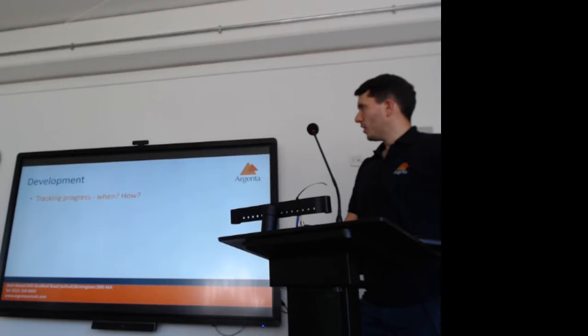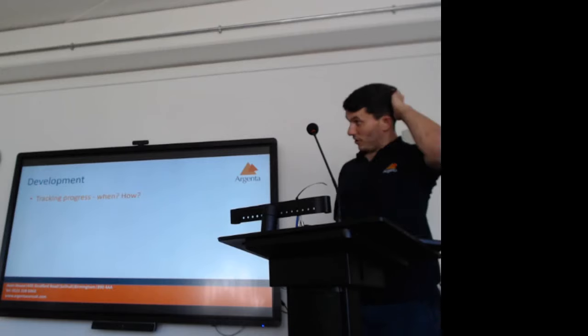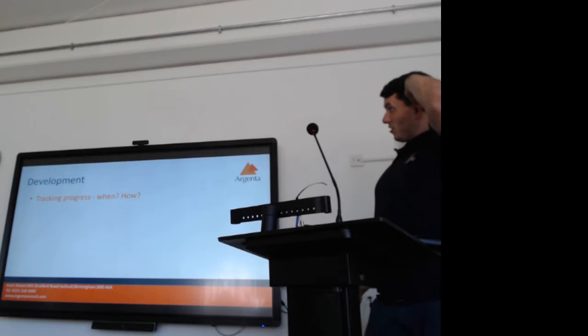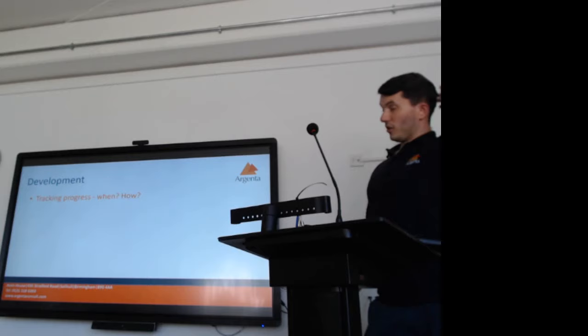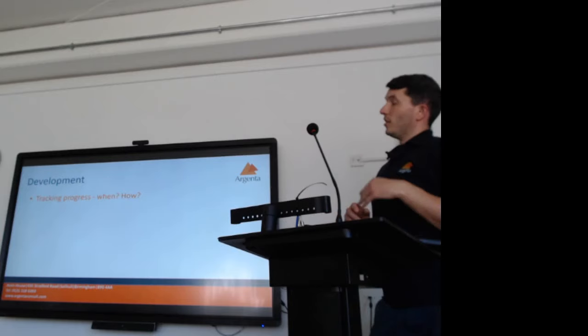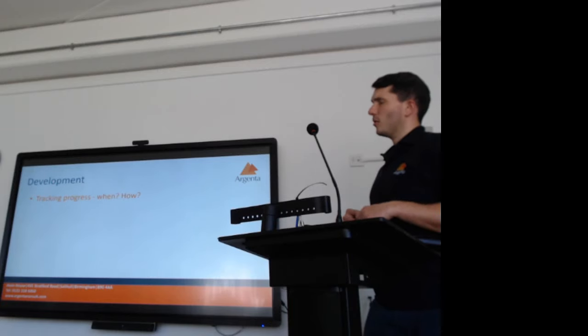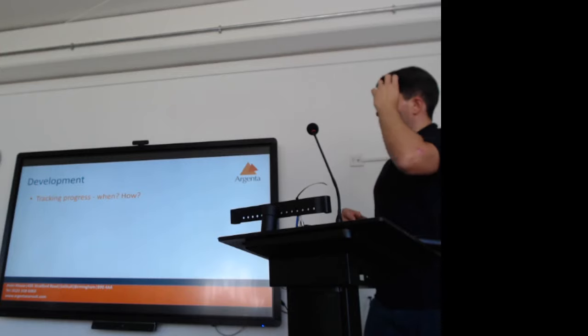So how do people manage development? Because there's lots of ways of doing it. Do we break it down into chunks at the start? Can you identify modules that you need to develop? Or I think it comes back to the risk one. I think you kind of need to pick those things that you know are risky. Like talking to hardware is always risky, so you want to try and mitigate that as soon as possible, get that developed as soon as possible and tested.